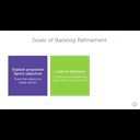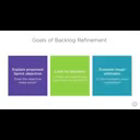And second, does my rough estimate for this item seem reasonable? I'm sure that it won't be as accurate as the estimate that the development team will arrive at using Planning Poker, but am I in the ballpark, so to speak? This is important feedback since it will tell me if I've planned too much work for the next sprint and need to adjust my plans accordingly, and it will help me better understand the effort that's required for each type of item so I can make better investments in our project in the future.